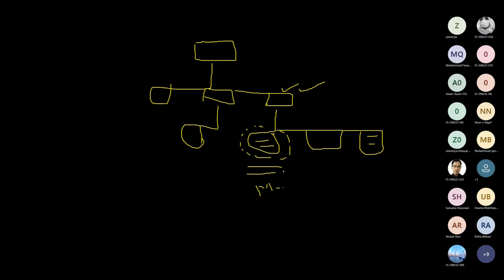Now somebody may get confused about what the appropriate level is. Shall I divide it further? We say no. For guidance, you can take it as a tip: if your project is small, you can divide it somewhere between 4 to 40 hours.